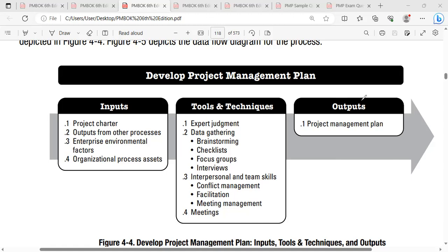You'll play favoritism to your project, right? Yes, that's the reason. Always the Project Management Institute asks you to have a separate entity. That entity will have the complete absolute power. This entity is called a CCB. Please note, Change Control Board.